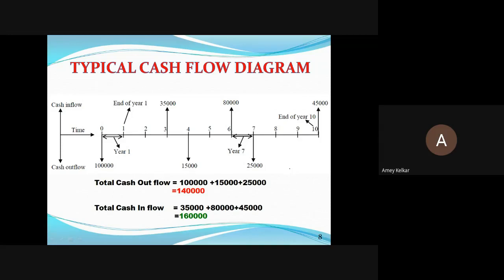Cash outflow will be there for materials, labor, execution, everything, and cash inflow will be the advances taken from the owner. Or if you have an outright contract where you have to finish the works, only cash outflow will be there up to the end of the project or the handover, and at the last handover stage you'll have one cash inflow.